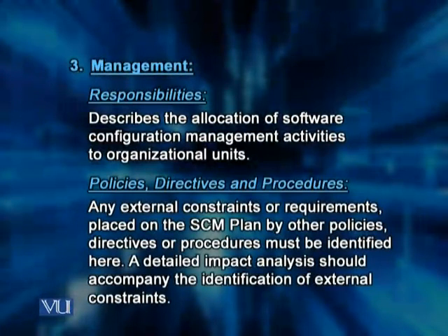This subsection, as is obvious from the name, documents any external constraints or requirements that are placed on the SCM plan by other policies, directives, or procedures, and these policies and directives and procedures must be mentioned in this subsection very clearly, and a detailed impact analysis should accompany the identification of external constraints so that conclusions can be reached, and if there are any conflicts, they should be removed.